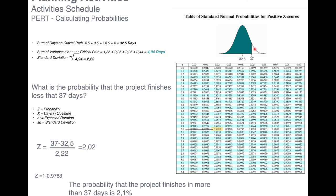The PERT method is more complex but also more comprehensive than the critical path method because it works with three possible durations — most likely, pessimistic, and optimistic. From these, we derive the expected duration, variance, and standard deviation. With expected duration, critical path, and standard deviation, we can calculate the probability of finishing the project within any agreed schedule.